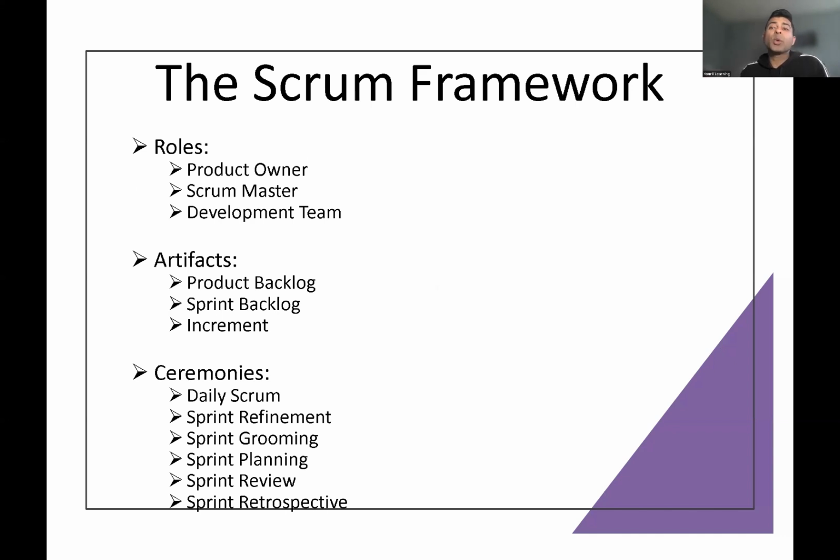If I talk about the product backlog, whenever you write a user story or gather a requirement, think about it. The subject matter expert or the stakeholder came to you and said, I want to add Spanish language onto the portal, and then I want to add Arabic or Russian language onto my portal next year. You said great, if you want something in the next year, let me create a user story and put it in the product backlog. It will not come into the sprint planning because it is not important right now. But still, as the stakeholder wants it, you will create a shell user story and put a little bit of detail in it.